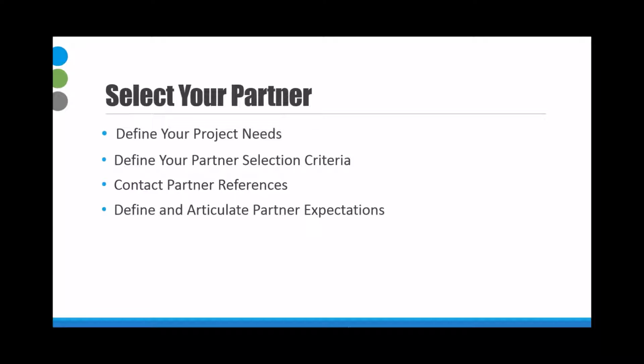And this one may not make your initial list, but it's an important one. Will this partner be a cultural fit for your organization? Will your team like working with this partner? As a project manager, will you like working with this implementation team? It was funny on the project that I worked on specifically, we aligned all of these kind of partner attributes and scored them. And in the end, it really came down to everybody being very strong in technology, their understanding of CRM, even their project fees and timelines were very much aligned. So ultimately, when it came to making our decision on a partner, it came down to who were we most comfortable with. So don't underestimate that cultural fit in evaluating your partners.